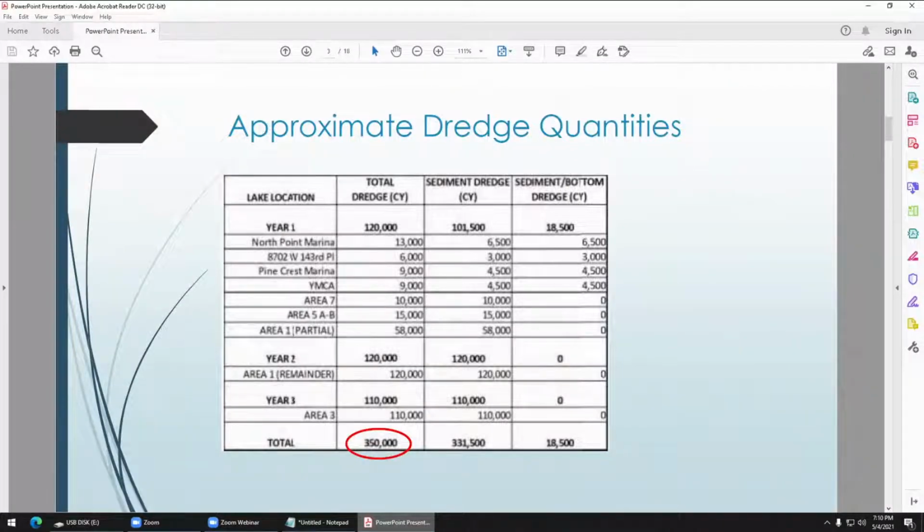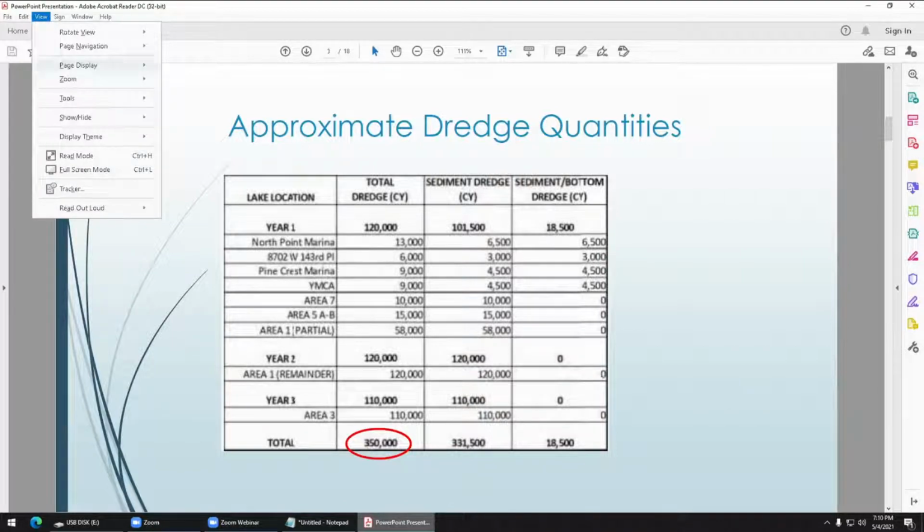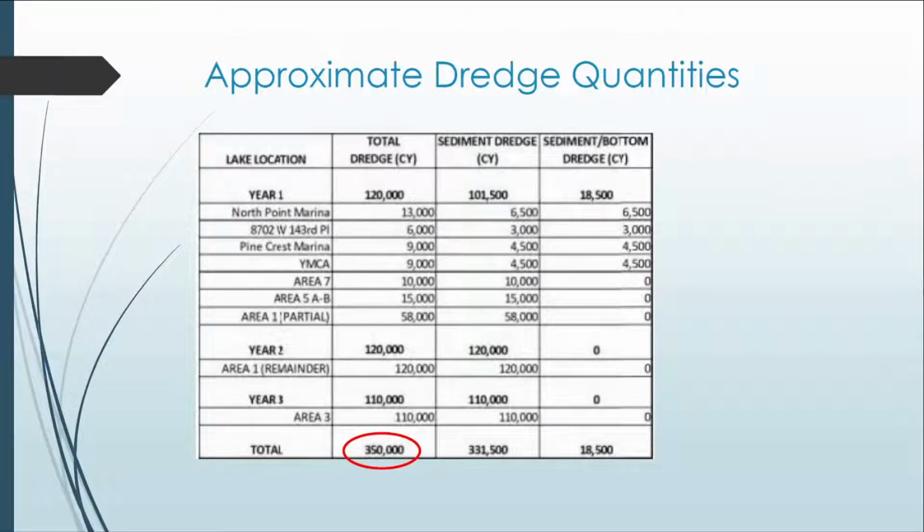So it's a little bit small on that screen. In the red circle there, it says 350,000 cubic yards. So that sediment is roughly 40 to 60% water. So we expect that if you take 100 cubic yards of material, for example, it'll squeeze down after it dewaters to 60 or 40% of its original volume. So to maximize the capacity of the sediment dewatering basin, we want to extend this project out to 3 or 4 years to allow that sediment to consolidate, meaning that the basin will be smaller because you can pump more material into it next year, and that material would then consolidate.